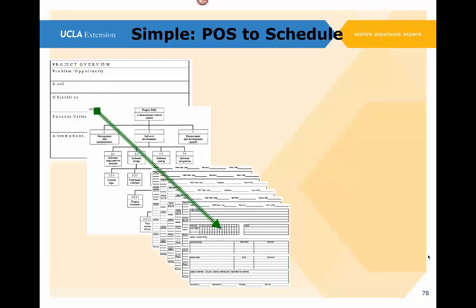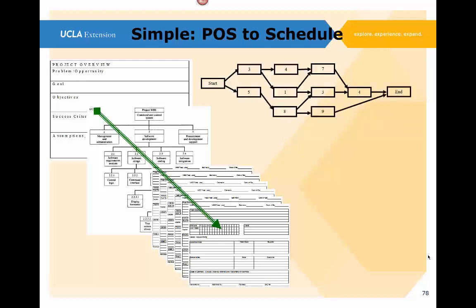And then for each one of these tasks, you want to fill out or make, this is just representative, a task description sheet which describes the task and all the resources and the duration of the task and all the elements, the basis for your estimate, where it comes from. Really straightforward. Have one of those for every one of your tasks, and then you can refer to them as you go forward. And also there'll be a clarity in understanding what the tasks are.